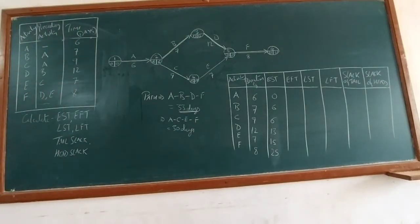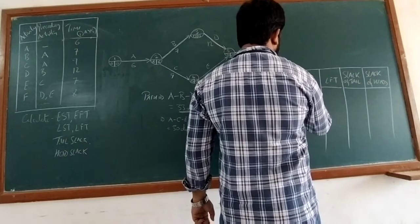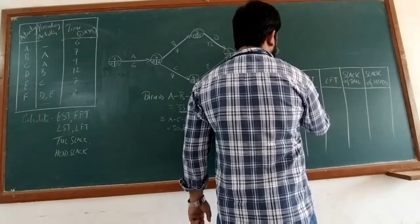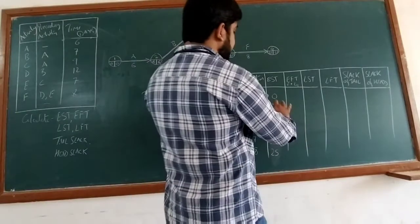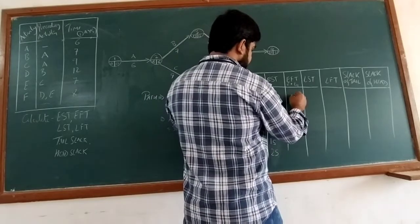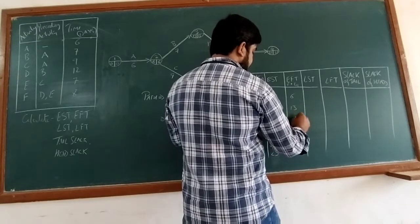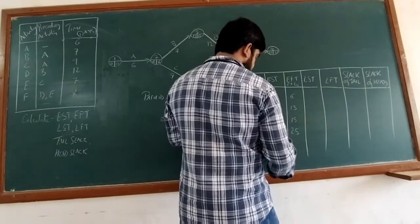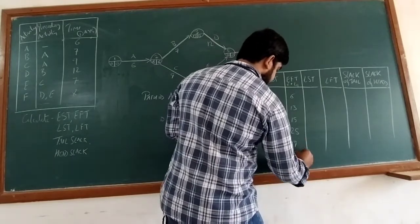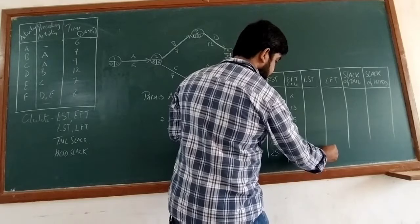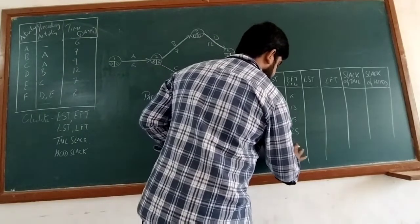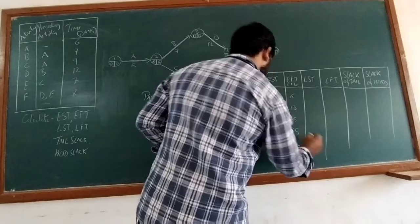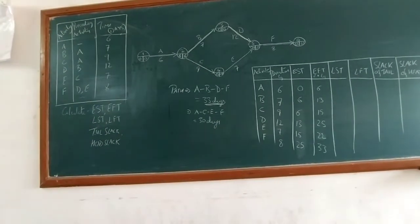The formula for EFT is: earliest start time plus time required to complete the activity. So: 0 plus 6 gives 6 for A; 6 plus 7 gives 13 for B; 6 plus 9 gives 15 for C; 13 plus 12 gives 25 for D; 15 plus 7 gives 22 for E; and 25 plus 8 gives 33 for F.